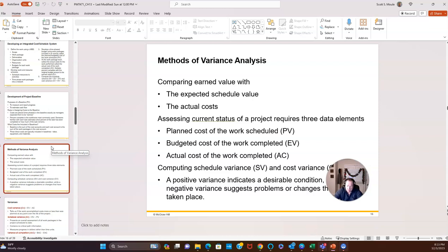So if you were developing a cybersecurity training over 6 months, and by month 3 you had already expected to have all of the training material defined, you expect to already have onboarded your trainers, you've already scheduled your training classes, you've already done your security analysis. Well, by 3 months in, have you actually done that? So it's just a way of tracking what you plan versus what you're actually delivering.